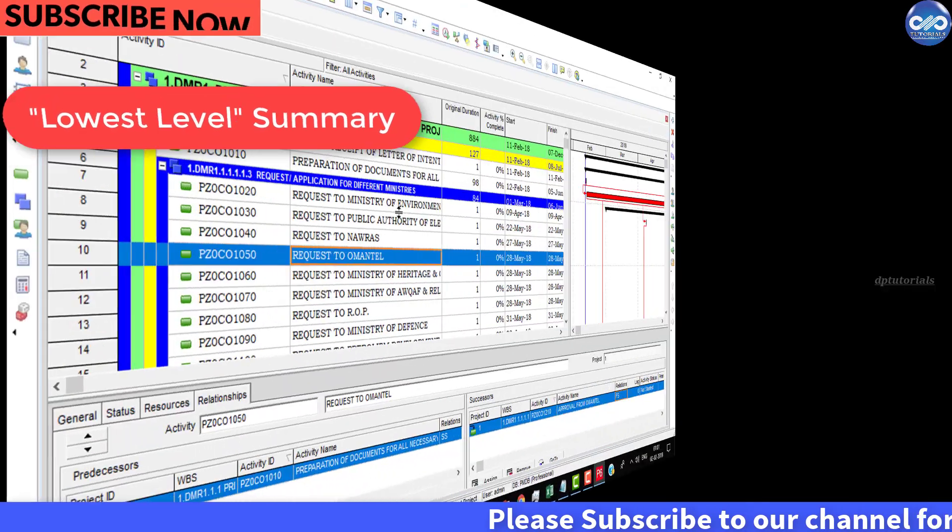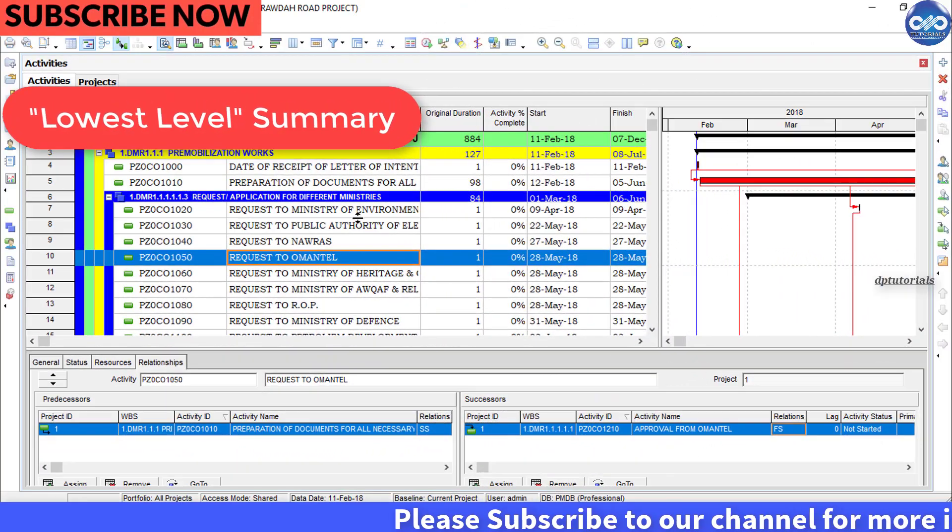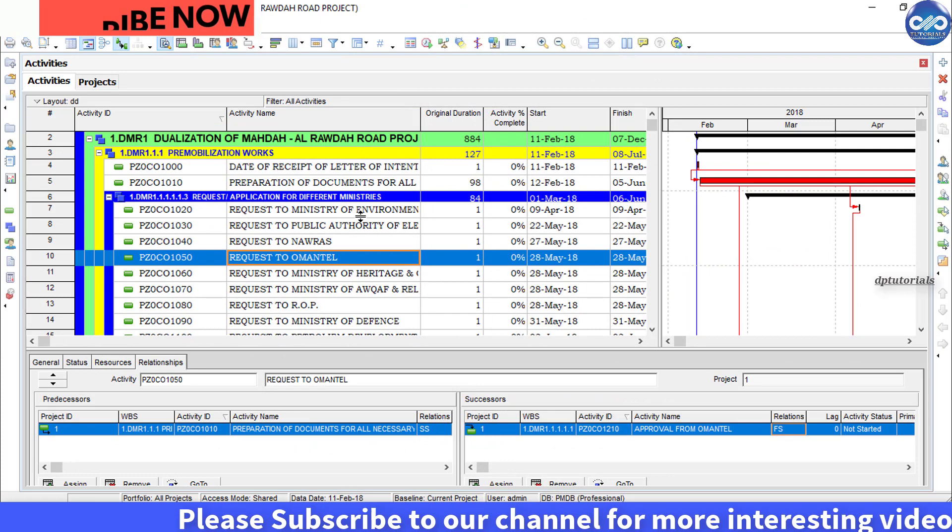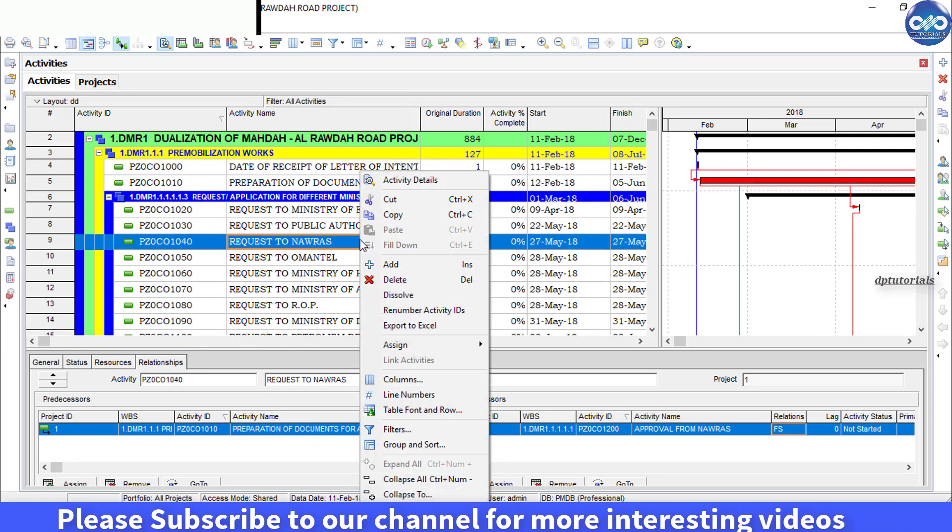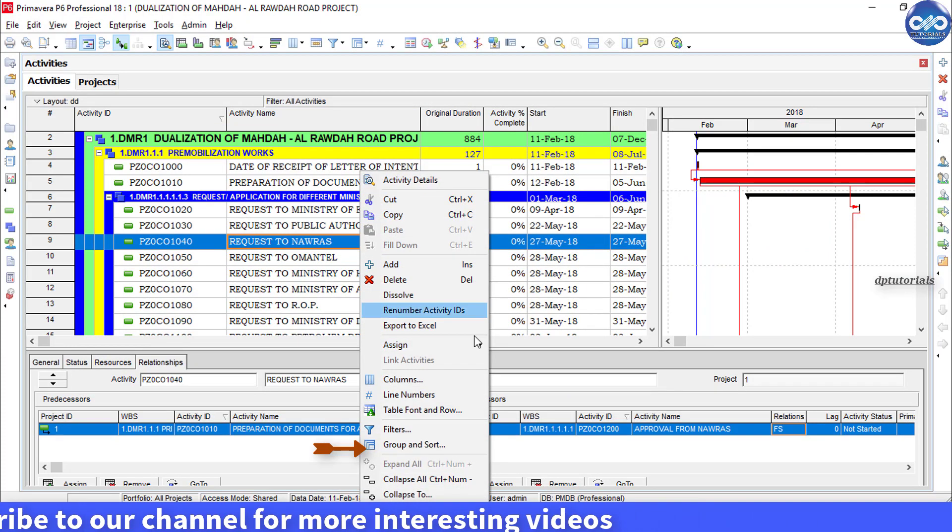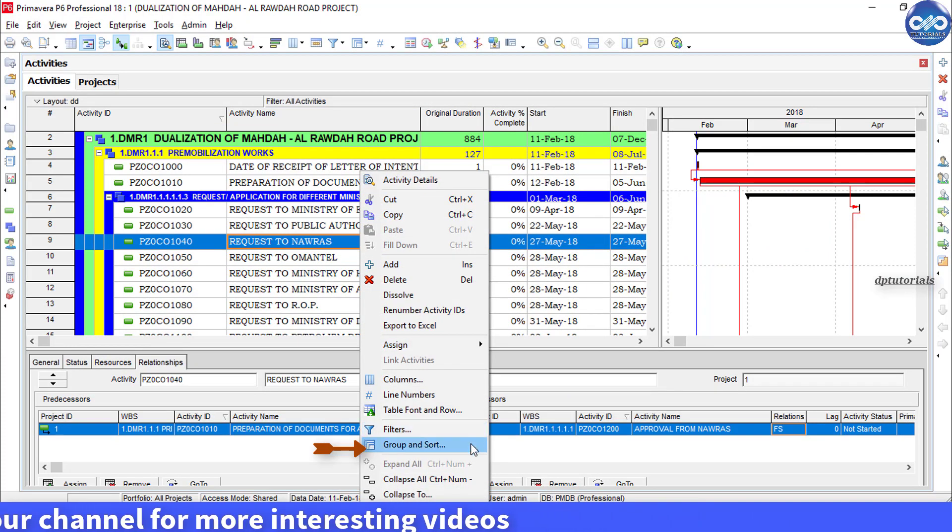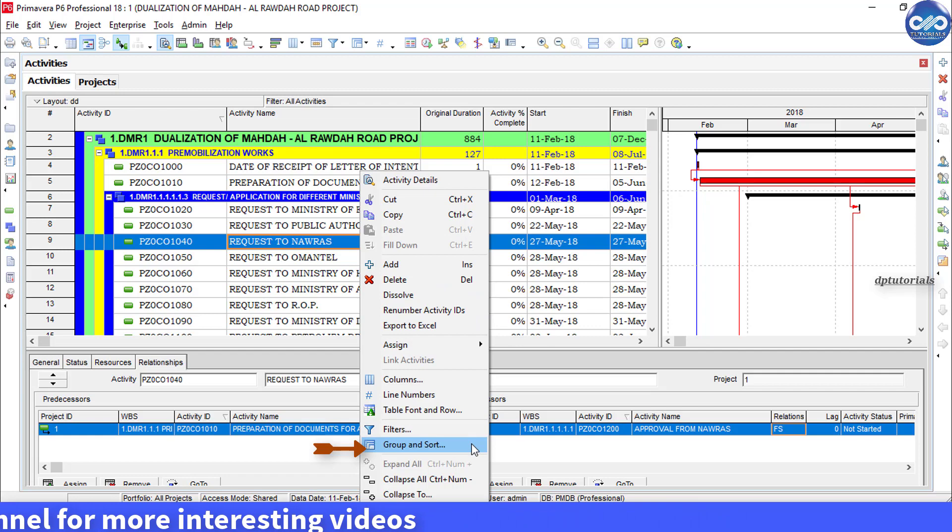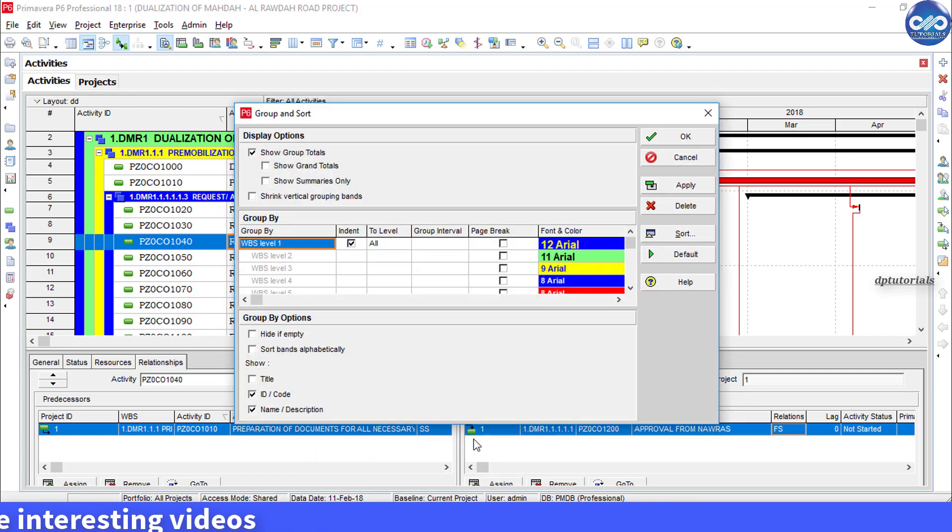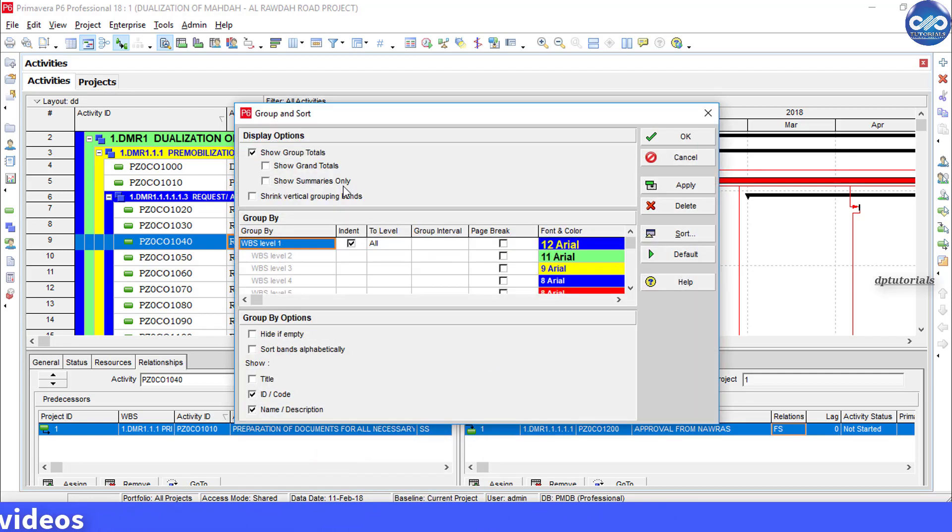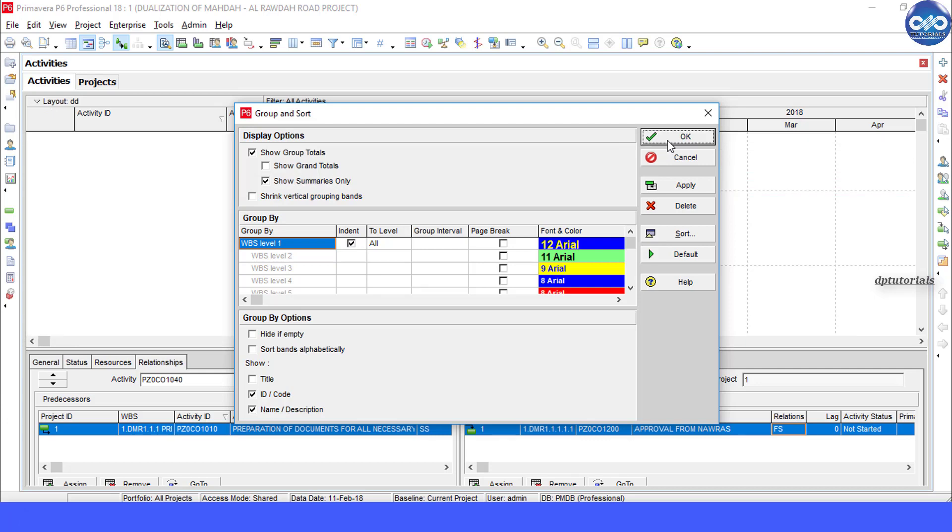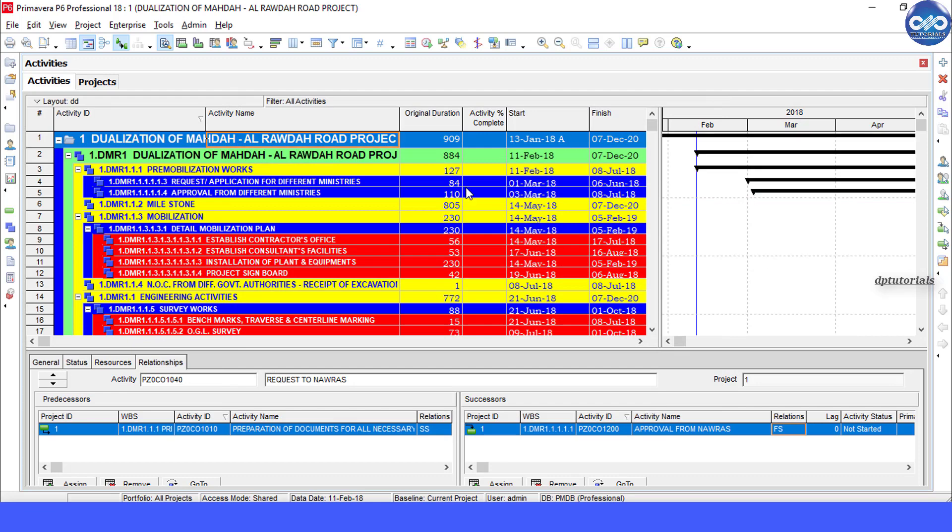Generally, to show only the summary data, what do we do? We right click in the activity table and click on group and sort, and we select this show summaries only option. Once you click OK, you can see that we get the summary data like this.